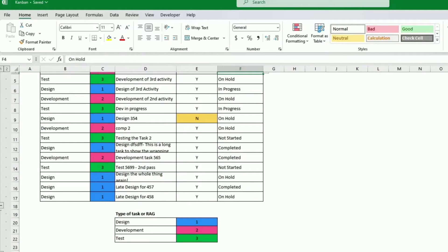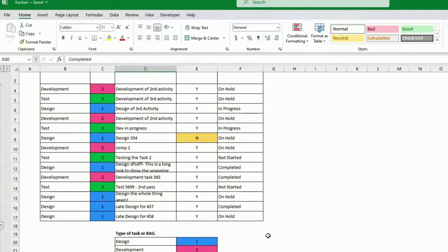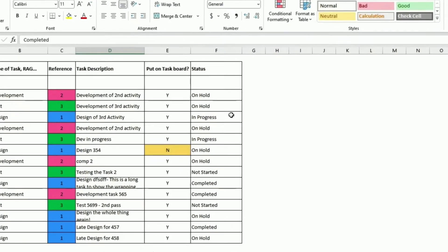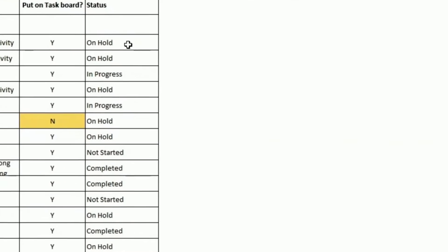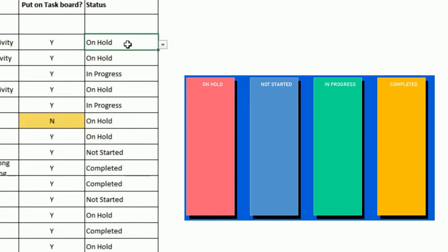I only have four here on hold, not started, progress, or completed, but you could have 25 if you liked, as long as you create 25 columns. So this is obviously, every Kanban shows something different.